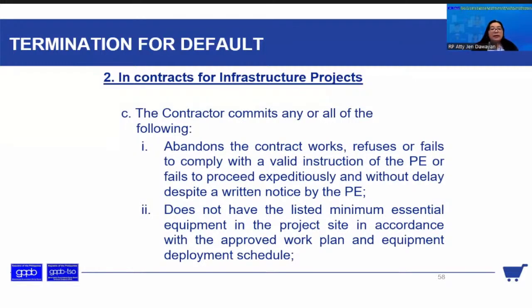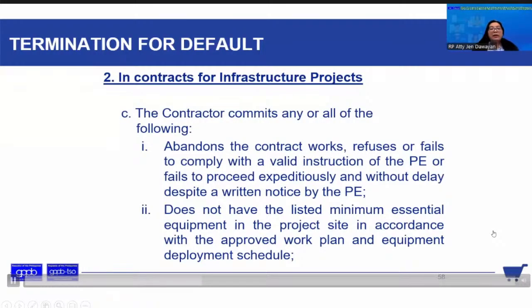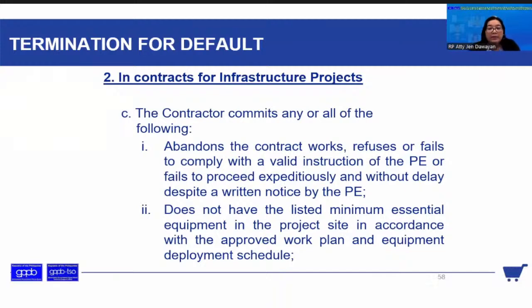And then he does not have the listed minimum essential equipment in the project site in accordance with the approved work plan and deployment schedule as probably submitted during the bidding or any revision thereto, no?